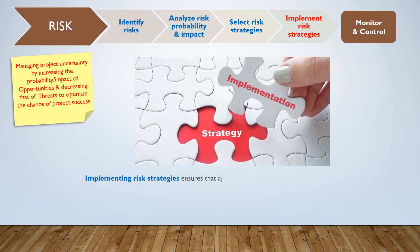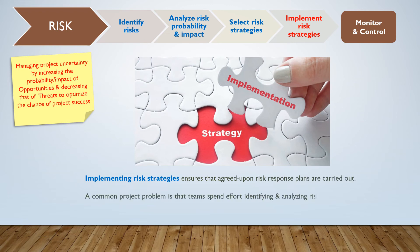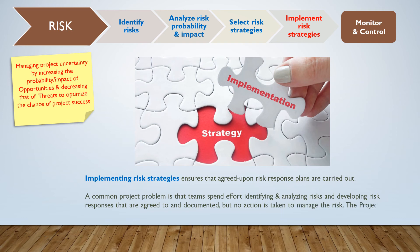Implementing risk strategies ensures that agreed upon risk response plans are carried out. A common project problem is that teams spend effort identifying and analyzing risks and developing risk responses that are agreed to and documented, but then no action is taken to manage the risk. The project manager must make sure that every risk response is properly implemented.